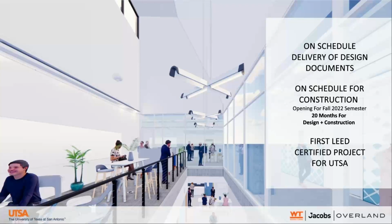It started construction in early December. We're currently framing out level 2. And this is all from starting schematic design in June. So now it's moving forward, and we've got fall of 2022 when it opens up. So just really delighted to share that it is continuing to push forward. It's also the first LEED certified project for UTSA, and really delighted that is happening in the midst of everything else.